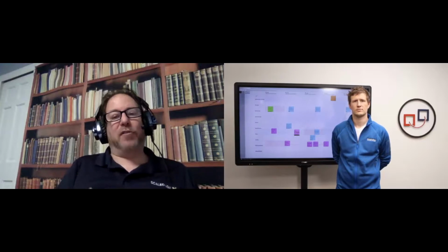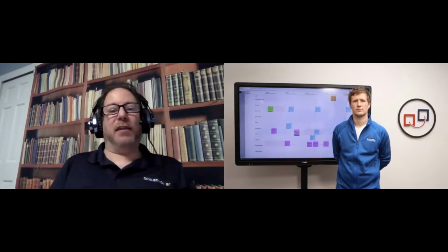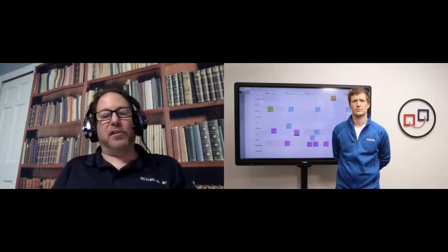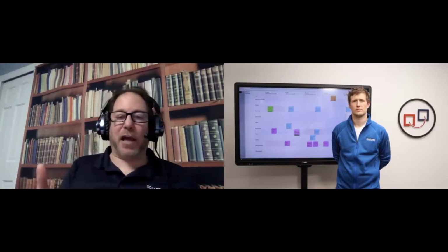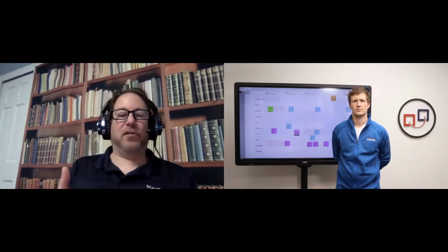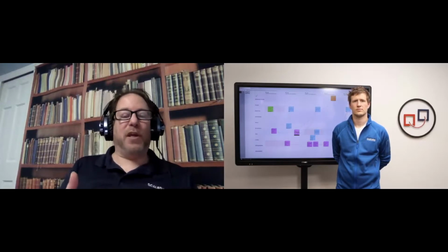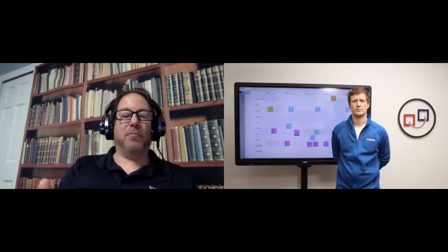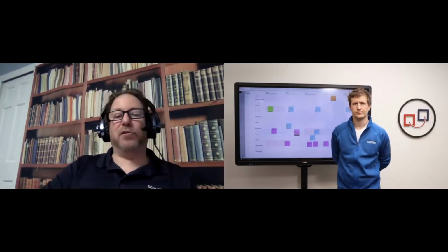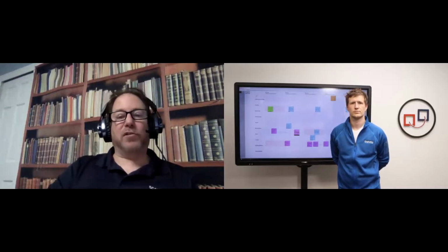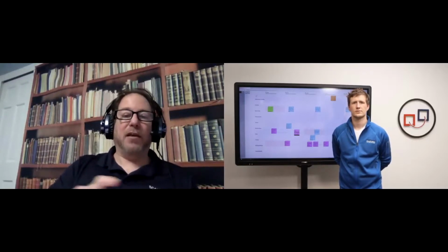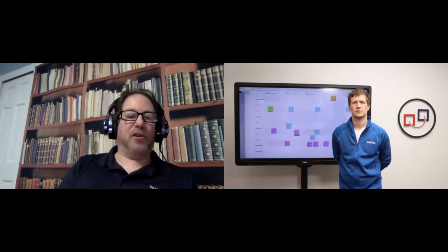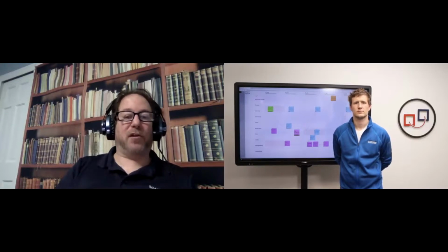So making the calendar visible and making calendar changes visible, and you might need sticky notes, or you might need a Slack channel or another tool like that to announce what the schedule changes are. When do we need to be back for the draft plan review? When are we going to be assigning business value to objectives, so that everyone knows when they have to get things done by. And a little bit more guidance by the Scrum Masters is always helpful to keep each of the teams on track during PI planning.